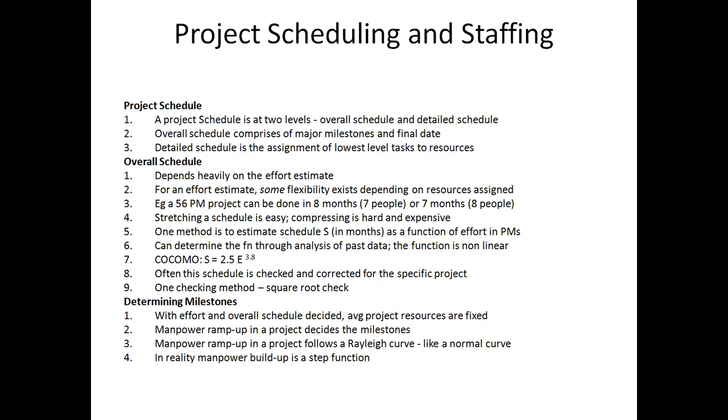And bear in mind that a detailed project schedule is always dynamic. It is not static. Changes may be needed because the actual progress of the project may be different from what was planned earlier, because newer tasks are added in response to change requests, or because of other unforeseen situations.